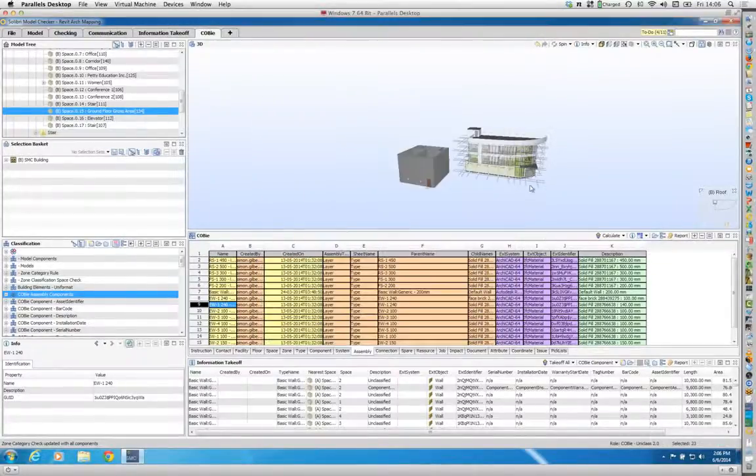The way that you can actually drive the system can be through the ITOs. The responsibility matrix contains two tabs called the type and asset tabs, so type and component asset tabs. They list the types of elements which should be either included or not included within a Cobie deliverable. To be quite honest, the list is ambiguous and it should be addressed for every project. So then you can go through and specify for the component and type the elements that you actually want to be delivering.